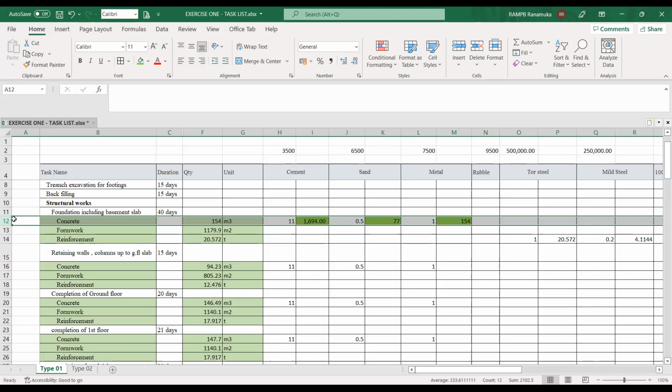So it is always good. It is easy for us when we are preparing the BOQ and the program tallying. That means both sequences are the same. Otherwise, it is difficult for us to do these kinds of cost allocations and financial progress.